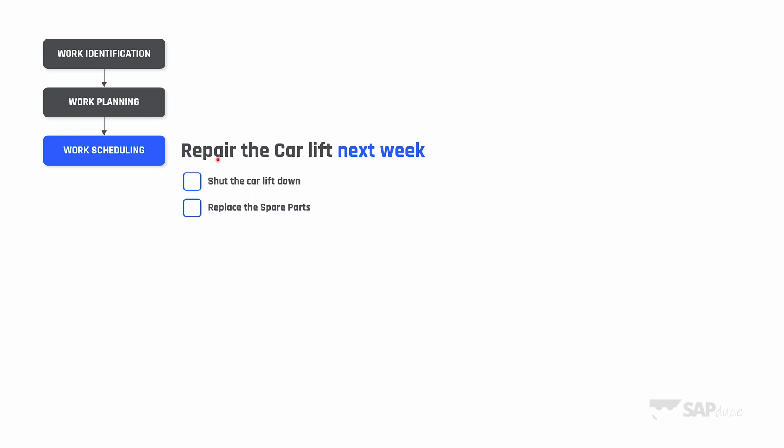Now we can switch to scheduling. Scheduling means when the work has to be carried out. Our maintenance planner planned the car lift maintenance to be done next week. Of course there are many factors which matter. First, the most important one is capacity, in other words availability of your crew.